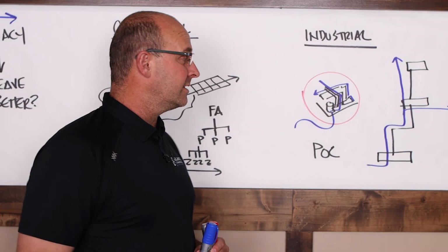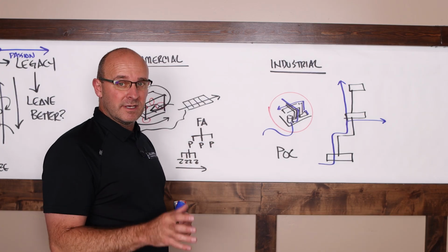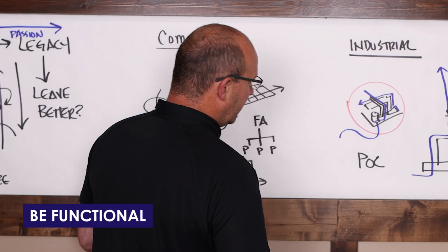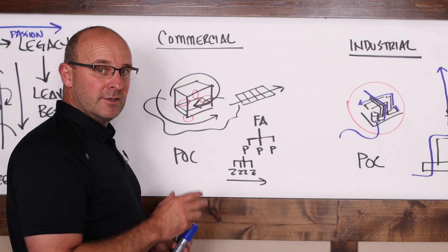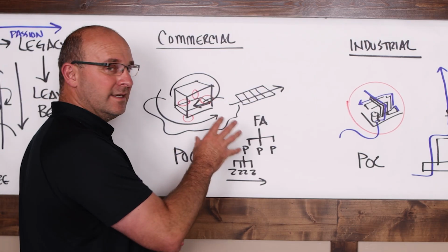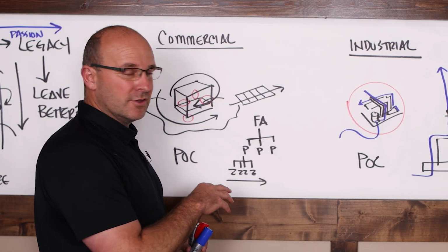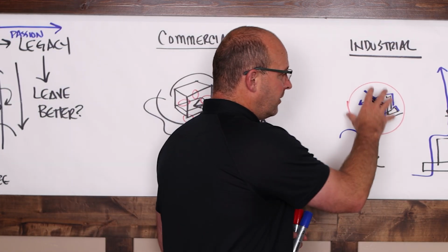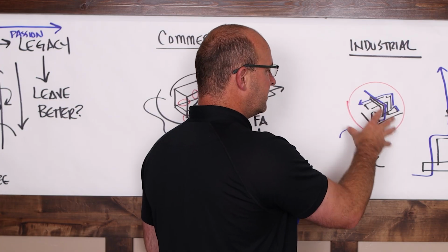In addition, so that kind of goes with everything. And from a QC standpoint, these systems have got to not only be assembled right, but be functional. You know, I hate to say it, but if you install a sheet of drywall and something goes wrong, it's not going to affect anything else other than the aesthetics, maybe some mold, you know, maybe it doesn't look great, right? But you do something wrong here, there's a leak, it's not pressure tested properly, you're affecting the overall system.